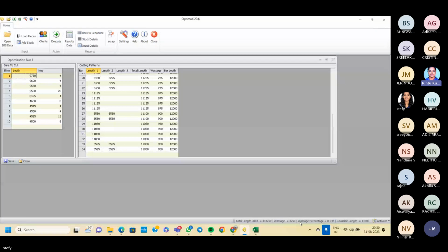And what we can do is use this bar in a combination if we have another set of BBs to be cut. So suppose this was the beam data for ground floor. You can use the column data in combination if the same 16 bar is being used for the column. Usually, we prefer the same dia of bar as main bar for column and beam so that at purchase time you don't have to go for different bar length. And whatever extra wastage or extra length is available in column can be reused in beam and vice versa.